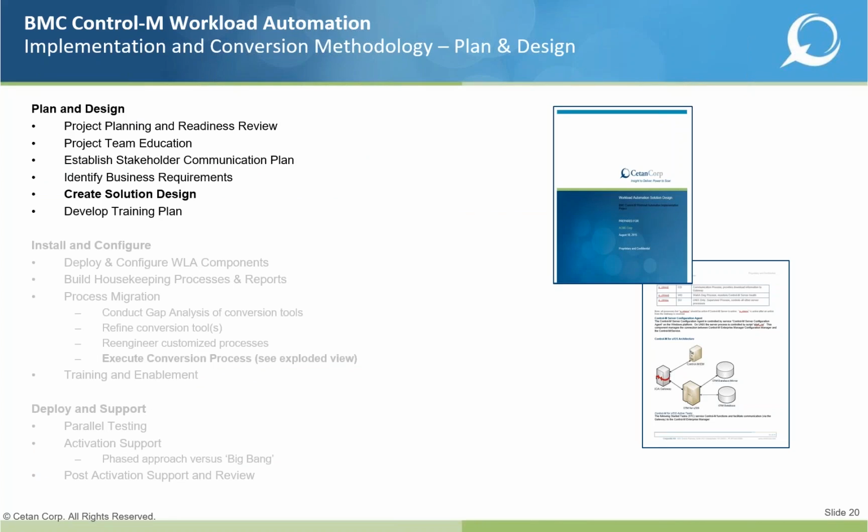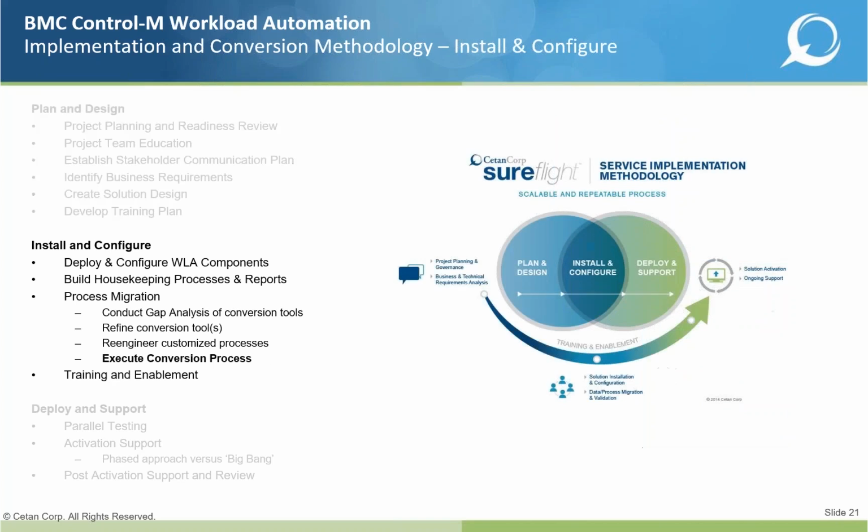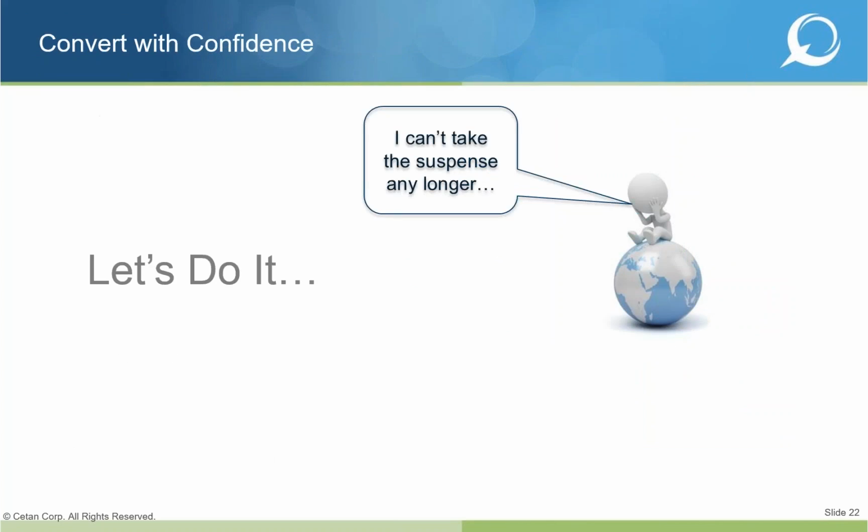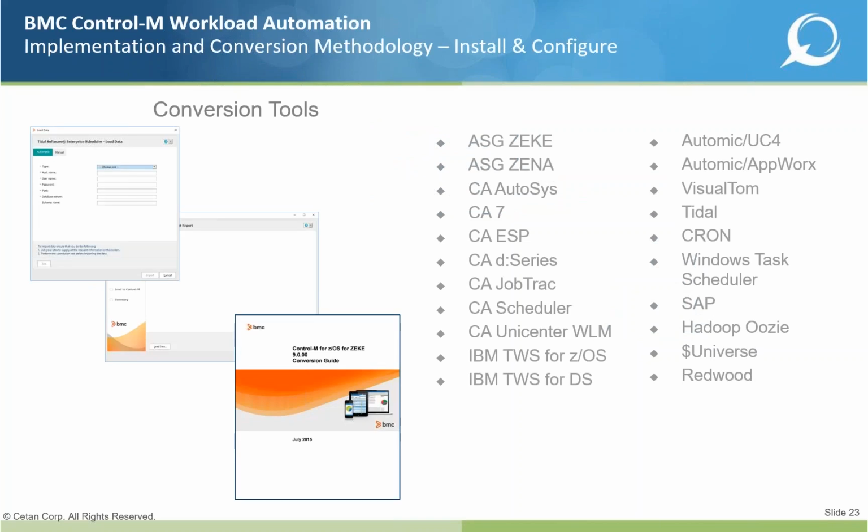And those are all things that, in our experience, can have a more significant bearing on the successful outcome of the project. And to that end, there's a whole other series of tools that we have. For instance, our application discovery questionnaire, where we reach out and touch every application owner for every batch application in the organization so that we can start to understand the things that are unique to that particular business application, and try to understand if there's any customization. There might be some things that your finance team does that are entirely different from your data warehouse team that we need to include in the project plan.